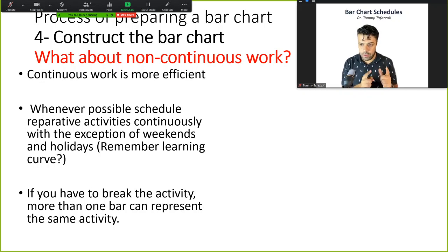For example, if you need to do ABC 4 times, ABC, ABC, ABC, ABC, don't do it like that unless you really have to. Finish the first round and then go to the second round. Always, you should try to do 4 A's, then 4 B's, then 4 C's. This is how you should try.